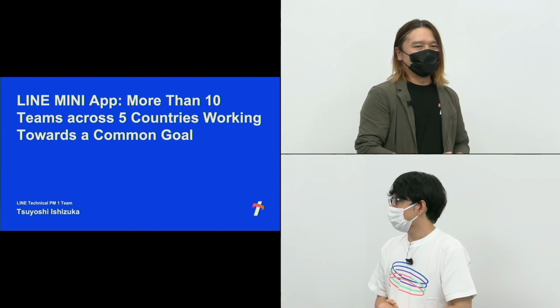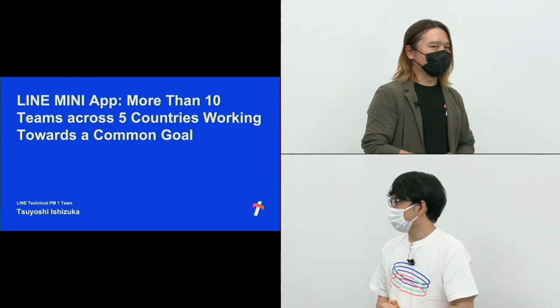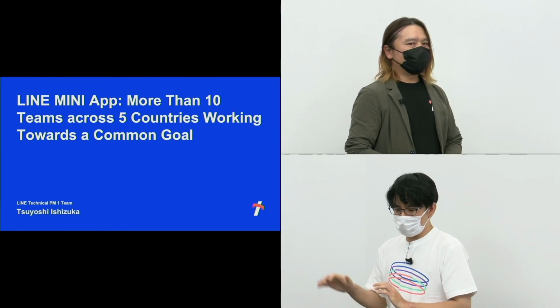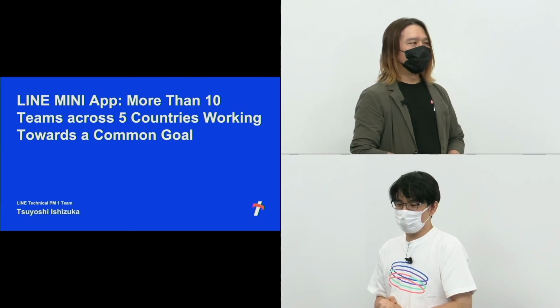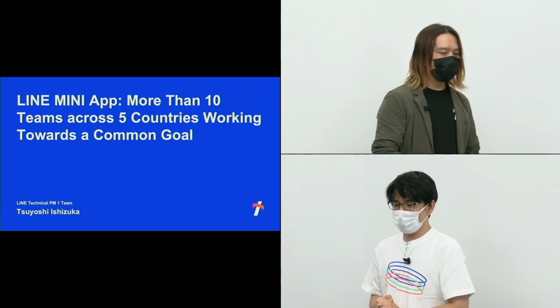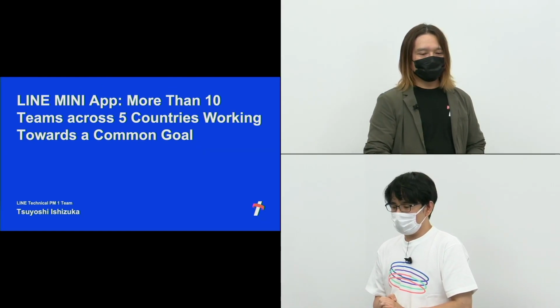You can't associate those epics directly, but the initiative is utilized so that we can aggregate those epics. I see. So you are leveraging epic and also initiative, which is on top. I learned a lot, thank you, because we could utilize initiative like that.